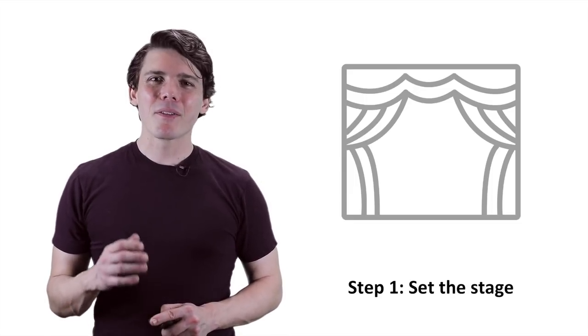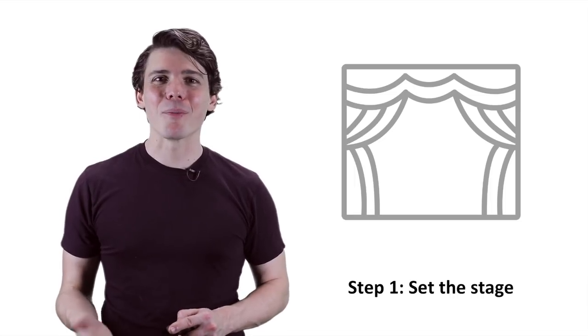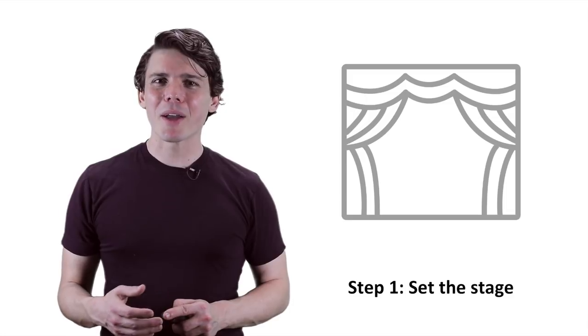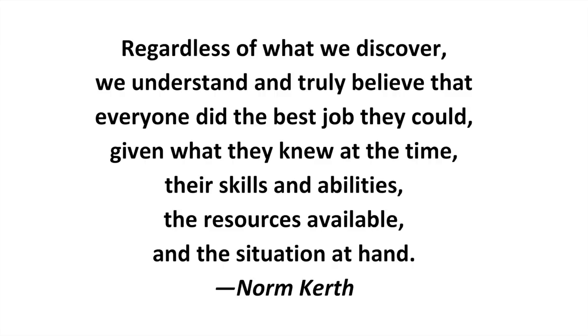Step one is to set the stage. This is a good chance to break the ice with your team, and remind yourself why this is so important. I have a few activities I like for this step, and I recommend choosing two of them. First, I'd suggest reading Norm Kerr's retrospective prime directive as a team, which is, regardless of what we discover, we understand and truly believe that everyone did the best job they could given what they knew at the time, their skills and abilities, the resources available, and the situation at hand. This helps to create a collaborative environment for learning and continuous improvement instead of blaming individuals. Second, I like to ask each team member to share just one word about how the sprint went for them. This will give everyone a good sense of the mood in the room. Third, I like to invite team members to share a genuine word of specific appreciation for another member of the team.